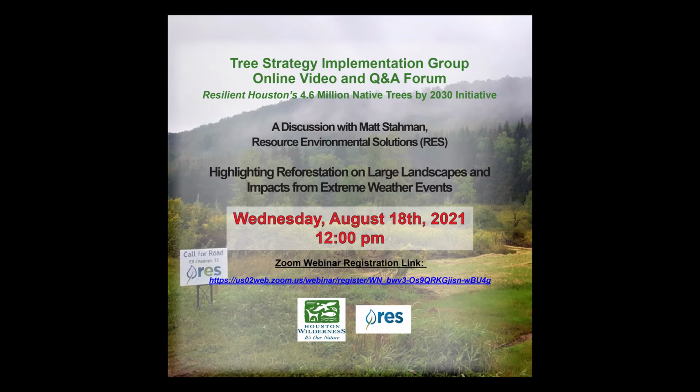Most projects, though, you're right, there's some sort of a ratio, or they run some sort of a functional assessment on the impact, and then they apply that functional assessment to the mitigation, and they make sure that you're putting the same ecological function back on the ground as you have impacted on the project, and that's more what we're used to seeing. Not too many districts, and we work nationwide. Res works nationwide, and we do all kinds of things, but mitigation is part of what we do. In my role as director regulatory, I see a lot of districts approach ratios differently, and it used to be every district, that's what they did. You had a ratio. If you're going to impact forest or wetlands, it's 3-to-1. If you're going to impact emergent wetlands, it's 2-to-1, or whatever, or some other combination.